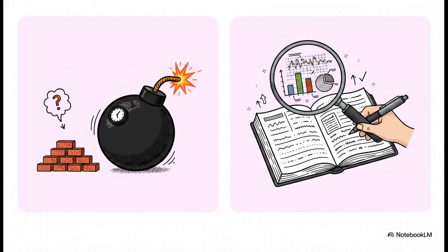Another major trick we see is underestimating the total contract cost. Companies will lowball the estimated total cost to show a temporarily higher profit margin today. But guys, this is literally a ticking time bomb for sudden massive losses in the future when reality finally catches up. And that is exactly why the AS7 fix demands that total cost must be based on realistic, up-to-date data, and any revisions have to be recorded immediately so they reflect in the profit calculation right away.